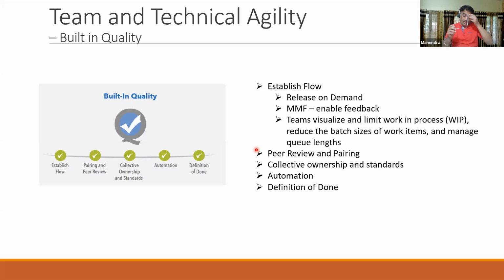In fact, that's exactly the reason the last sprint in a program increment, a PI, is known as the IP sprint, innovation and planning. There's a specific focus on learning and innovation in the Scaled Agile Framework.